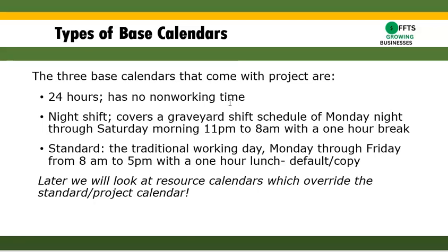Then you have the night shift, which covers a graveyard shift schedule of Monday night through Saturday morning, 11 p.m. to 8 a.m. with a 1 hour break. And then you have the standard calendar, which is the traditional working day, Monday through Friday, from 8 a.m. to 5 p.m. with a 1 hour lunch. This is the default calendar.